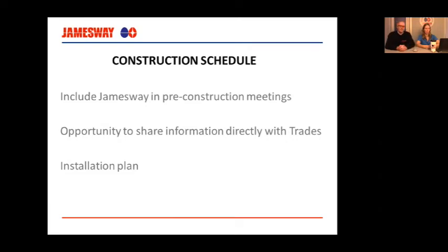That way it gives us an opportunity to view what the expectations are, not only from the perspective of the general contractor, but also from the customer. It gives us perspective as to how much time has been given by the customer and the contractor for us to achieve our objectives. And it can become a talking point if the time given is too short or too long.